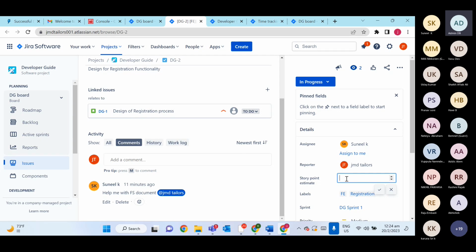For the same developer, he can deliver 5 story points in 3 days, and the same developer can take 7 days to deliver 5 story points. In a team, there will be some senior developers, some junior developers, some in training. Everyone will have their own capability or capacity, and they will deliver based on their capacity. So story point is not equivalent to your number of days.